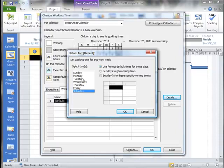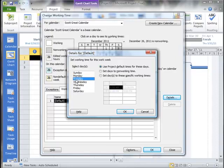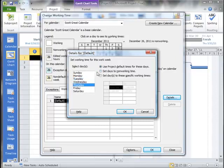But we can actually go in and override the default days. So what I can do is let's say we have this employee that's only going to work on Monday, Wednesday, and Friday. So I'm going to set, first of all, my Tuesdays and Thursdays to non-working time.